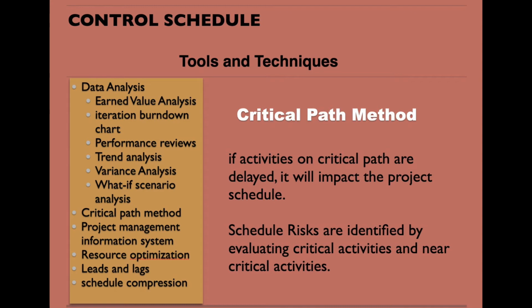If that activity is not on the critical path, maybe that delay will not impact the overall duration of the project. So critical path method, we have to analyze our critical path during controlling our schedule. To complete our project as per the schedule baseline, we have to work on critical activities.